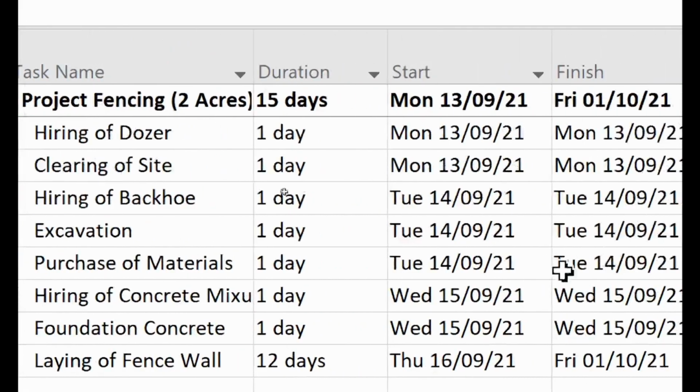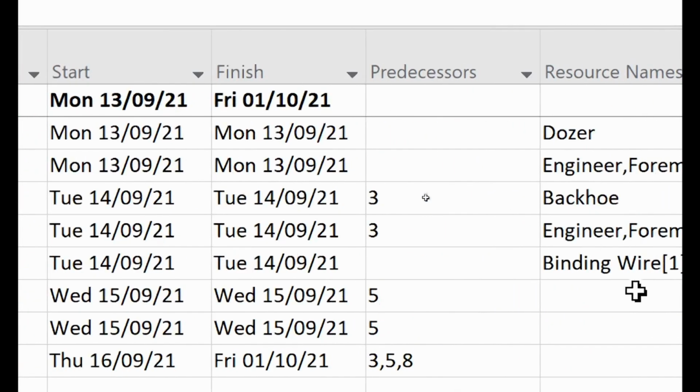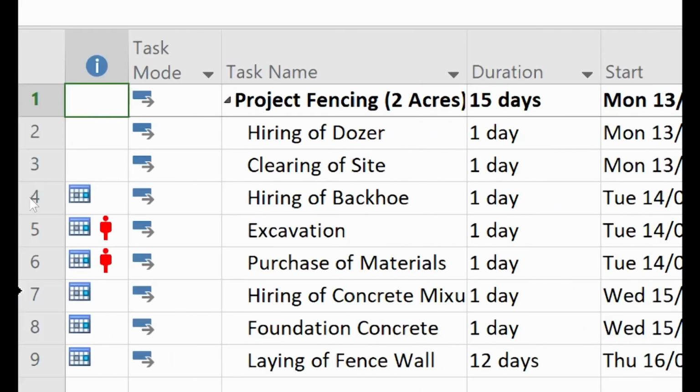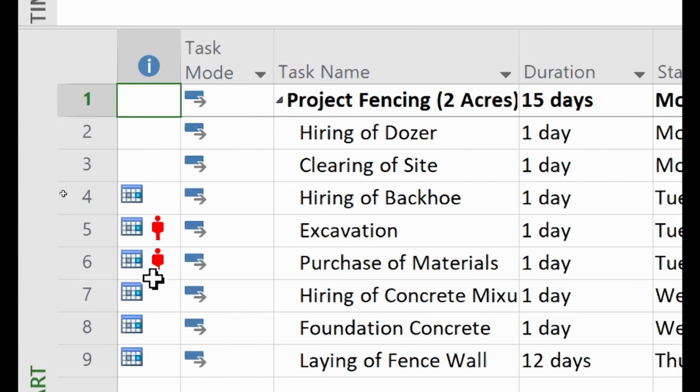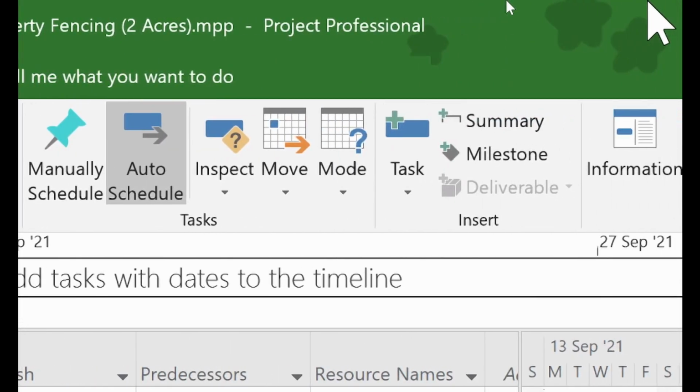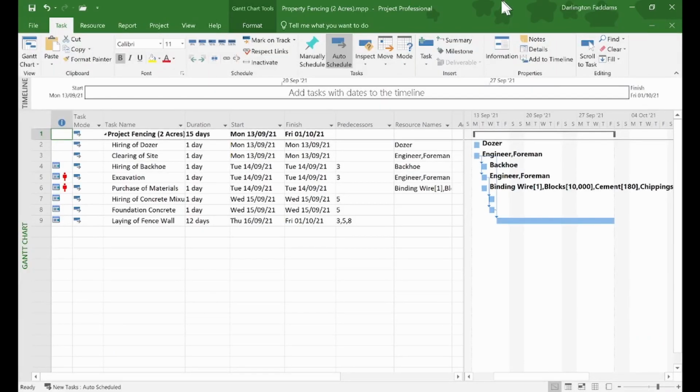For him to be on this duty is also an over allocation of resources. So what you can do is get the procurement person, because what it means is at that same time he's supposed to be doing something else. So we've added him to another task at that same time. So that is it.